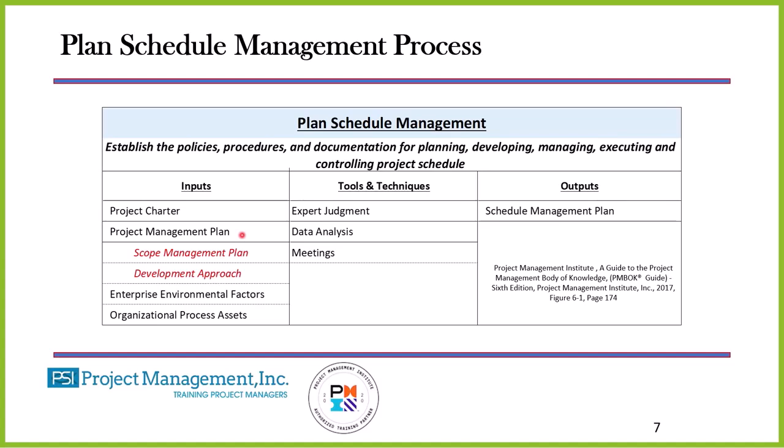First of all, the project charter is going to be a contributor because in the project charter, it will identify perhaps milestones that we have to meet. Milestones meaning when this project has to be finished or when certain things have to be delivered. It may have other constraints as well. It does have a very brief description of the project and the product, but we have to then get into the details. Of course, we're working on the schedule, we're working on the project network diagram.